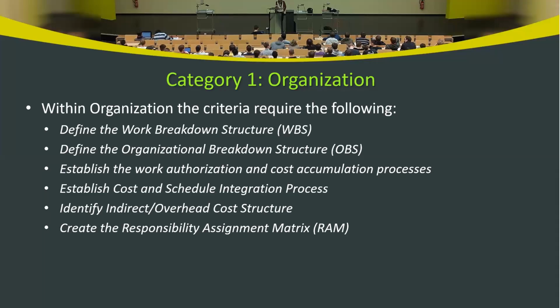So the spending varies across the project timeline. So before you can estimate the project budget, you need to know the project schedule. Then you need to integrate cost and schedule.